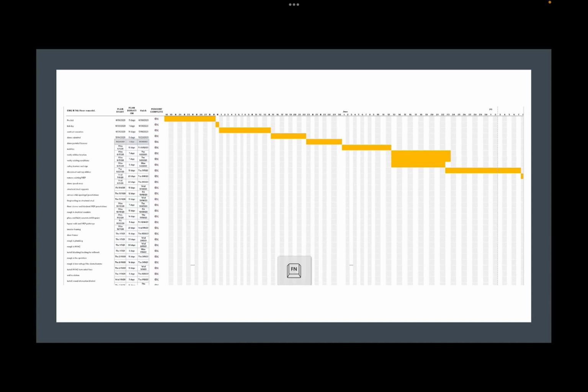You can see here from the bar chart I created that mobilization's predecessors include all the pre-con steps, and then mobilization becomes a predecessor to the general contractor's due diligence on the actual job site before construction begins, to avoid any costly mistakes such as hitting an unmarked line.